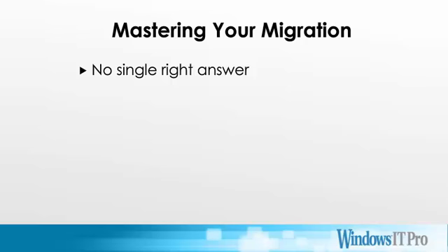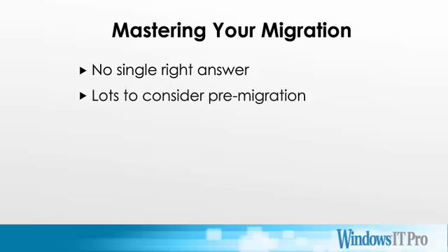So I think the real issue here is you have to consider a bunch of different issues before you ever get to the migration itself. Matt, I'm going to put words in your mouth. I think Matt would even agree. This is something you want to consider maybe even before deciding to go to Office 365, making the archive part of the project plan, not an afterthought. Some of those considerations are things like what should be included, what mailboxes, how old are the messages and the attachments, so define what needs to be moved over as part of your archive migration.